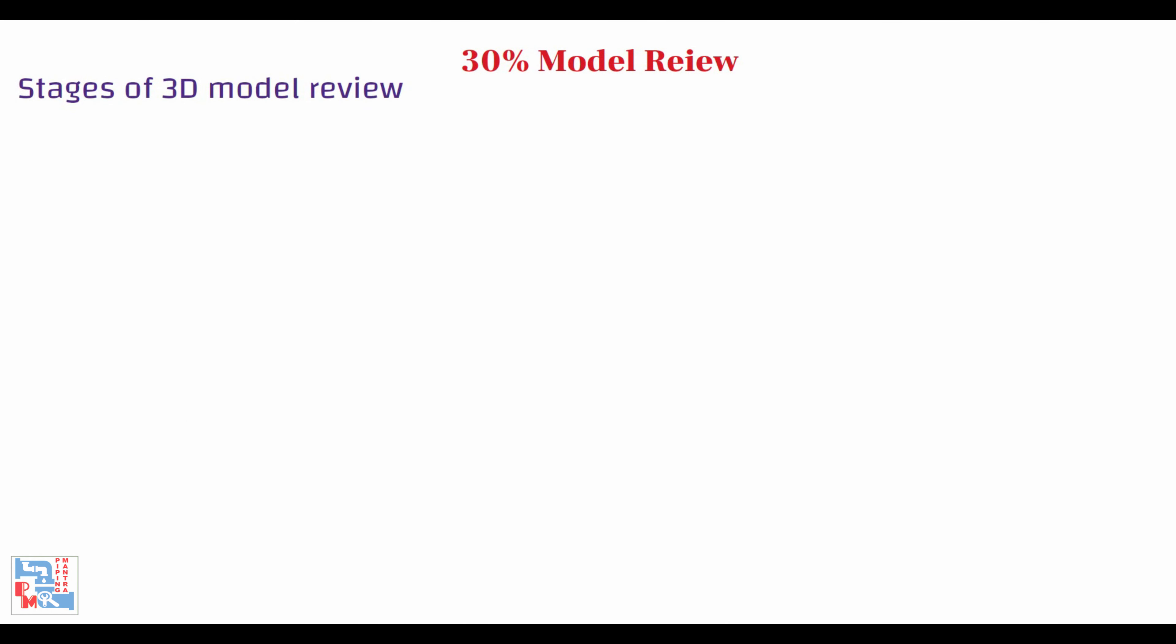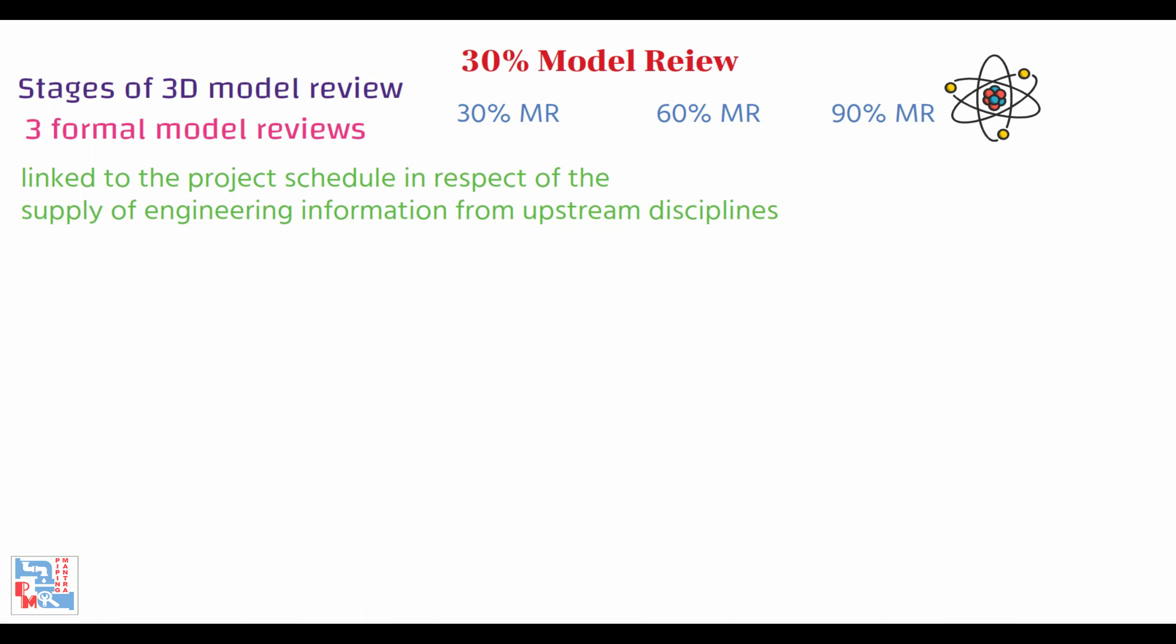It is planned to have three formal model reviews at stages 30%, 60%, and 90% of design completion. These stages are linked to the project schedule in respect of the supply of engineering information from upstream disciplines like process, mechanical, instruments, etc., being at the status of preliminary, intermediate, and final.